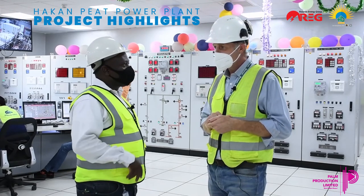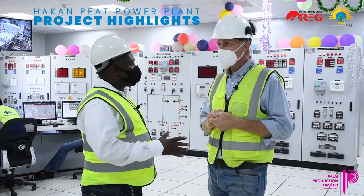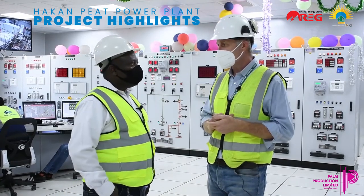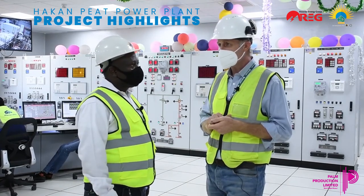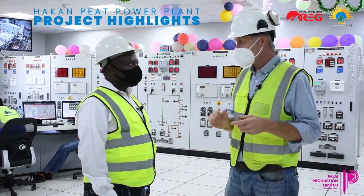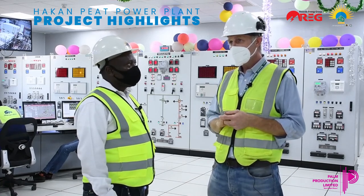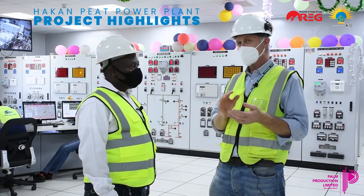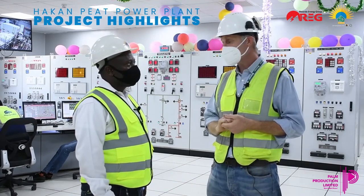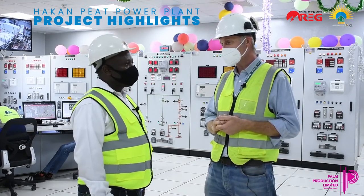What timelines are you talking about up to the commissioning? So is the project on schedule? No, we are 1 year behind schedule. We had a number of delays, namely, obviously, we've had COVID, which shut us down for a little bit. We've had a couple of outbreaks on site. We've had some problems in the connecting countries' ports in Kenya and Tanzania, where we had some equipment locked up for 6 months, some key equipment in Tanzania.